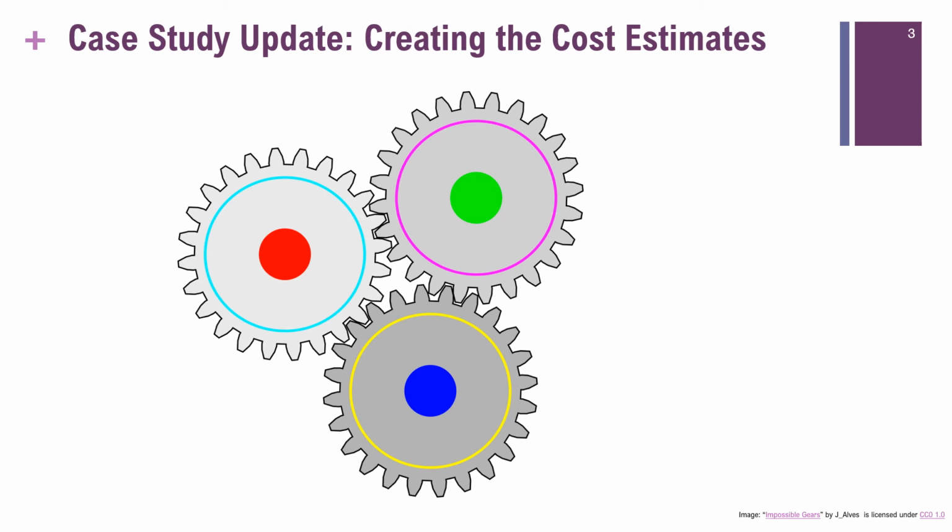For each activity, she also considers the amount of work that will be required. For some activities, she uses her in-depth knowledge of the work involved, while for others, she considers past projects. For the graphics-related work, she makes a quick call to one of the company's graphic designers to verify her estimates.